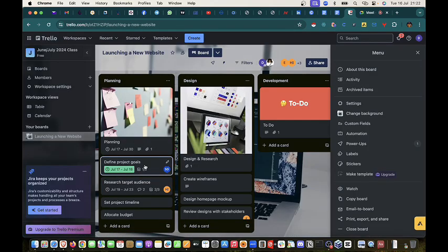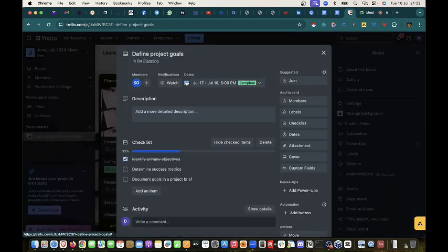Now, if you see this task is also showing as complete, the reason is because Stella marked this as completed here. If you were using your laptop, you would see it the way I'm seeing it, and you would know that this is marked. So I've removed it, and it's showing us that this project is 33% complete. The moment she ticks the three of them, every single thing here, it will show you 100% complete, and it will tick this as well.